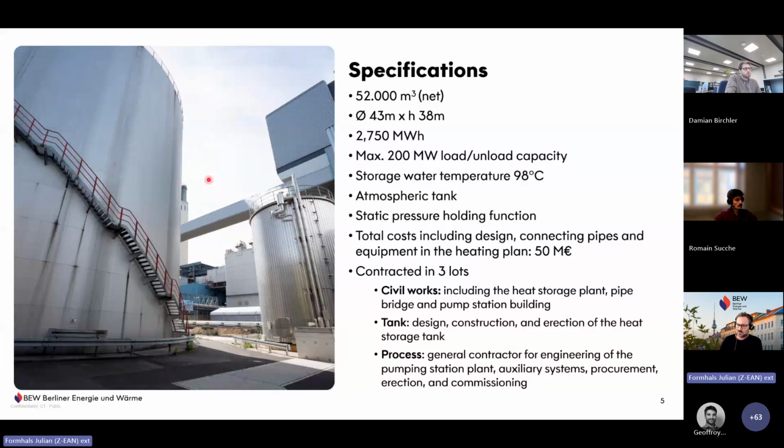The total cost, including all design, connecting pipes, equipment, and the storage, amounted to 50 million euro, which is higher than what you would expect when you only look at the specific numbers that we saw earlier in the introduction presentation with this regression curve where you have the specific storage costs.